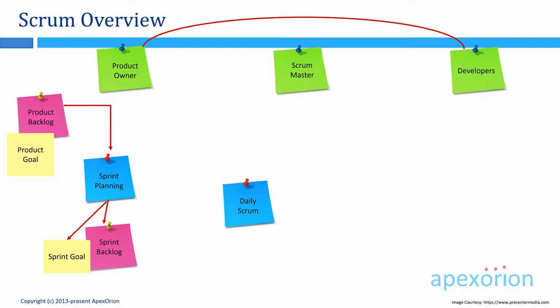And third, to learn about the impediments. The Scrum Guide is very silent about whether or not product owners should attend this event. I highly encourage product owners to attend this event. The reason is these 15 minutes that they spend with the Scrum team during the day are going to help them understand how the team is doing towards the sprint goal and also see early red flags. It improves collaboration and reduces the time that the product owner might spend chasing down the developers on the Scrum team.